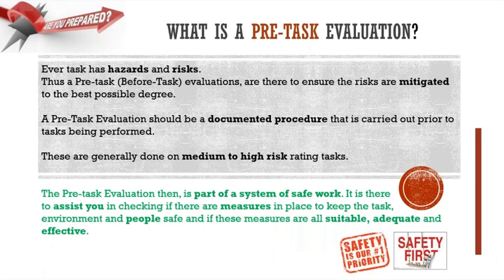Now, before we start with what is a pre-task evaluation, we must just stipulate there are some documents that might be in use already by yourself, and this could be a job hazard analysis. This is very similar to a pre-task evaluation. However, it is broad. So a pre-task evaluation could be evaluating anything from the site to the task to the tools to the people. A job hazard analysis is a little bit more specific in that it takes one specific task. It identifies only those related risks and hazards and then does an analysis on that. Whereas a pre-task evaluation is a little bit more taking the environment into account.